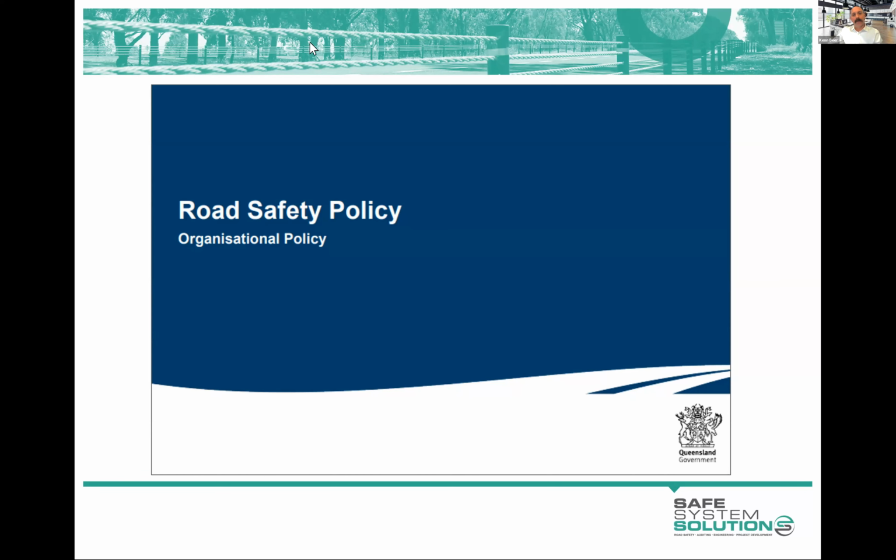So a question has come in for Queensland: is it even in the detailed design phase? No, I think it's that for each project at some point it has to have been subject to a safe system assessment in the life cycle of that project. So if it has been done early on, they're not requiring it in a detailed design phase. There is a point in the business approval process in TMR where they're saying a safe system assessment has to be done, and it's not at detailed design end. It's more in the planning phase.